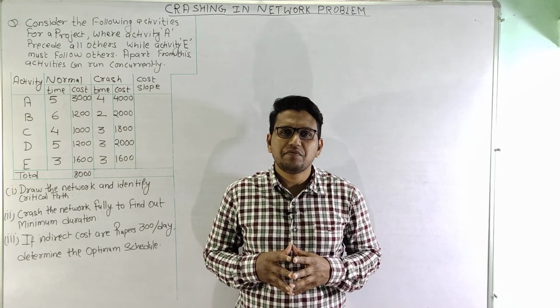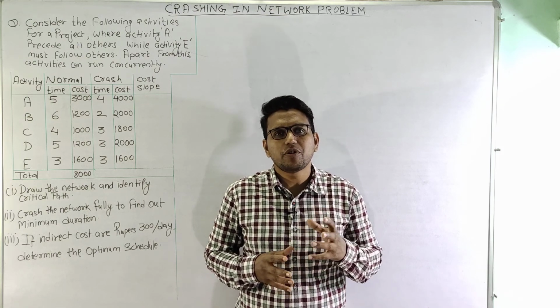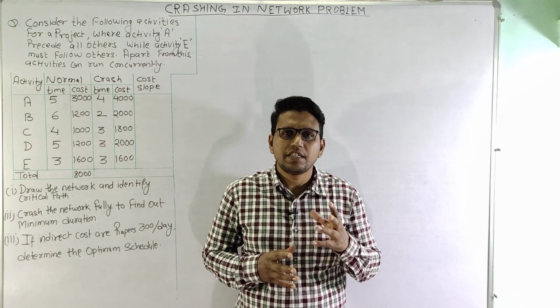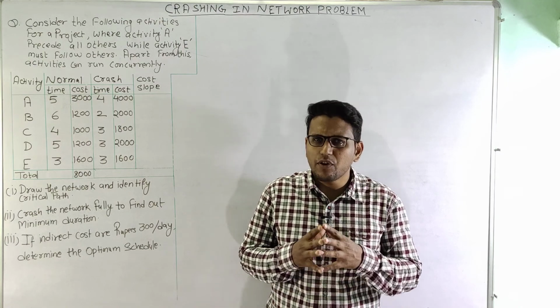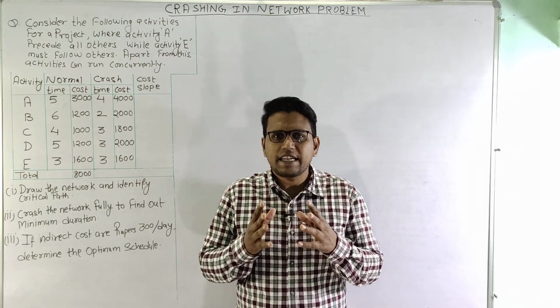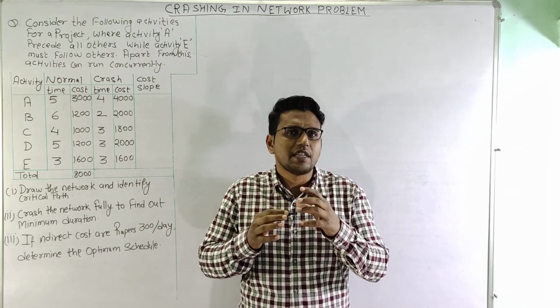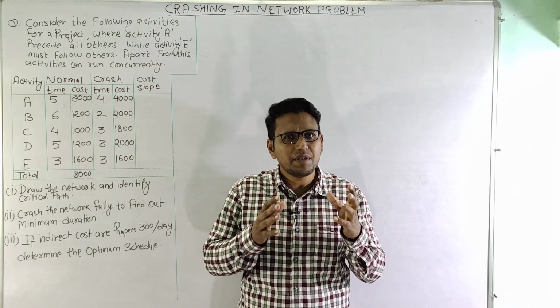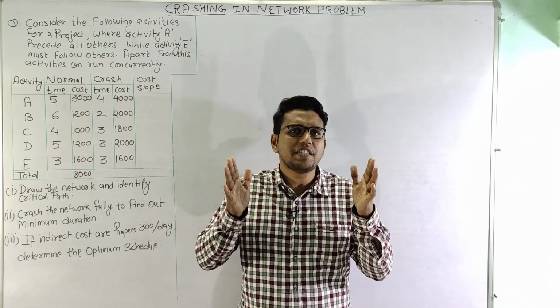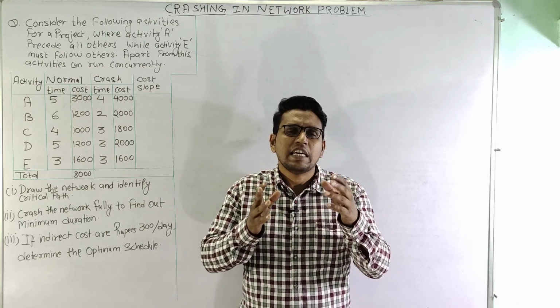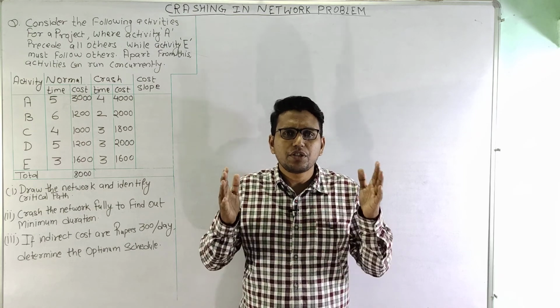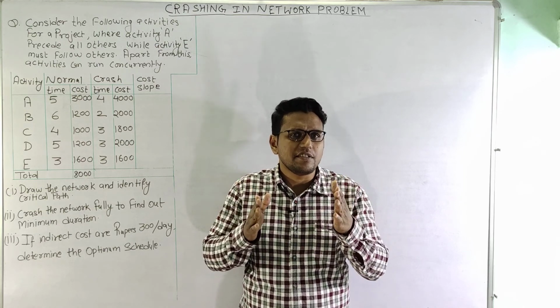In today's lecture, we are going to see another very important topic of crashing in network problem. So let us first of all understand what is crashing. Crashing is basically compressing the critical activities, and by compressing we mean that the duration of the critical activity is decreased, and as a result the duration of the overall project is decreased.